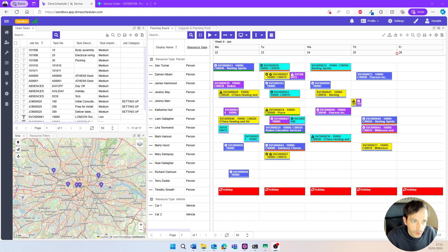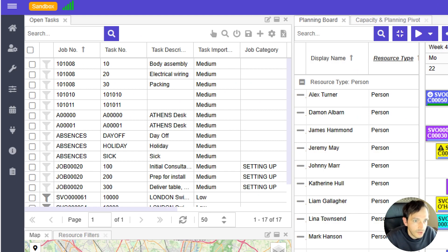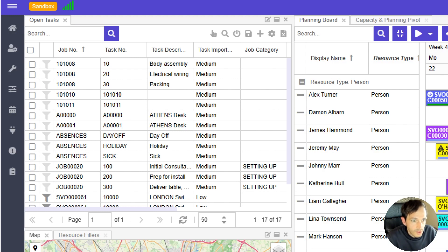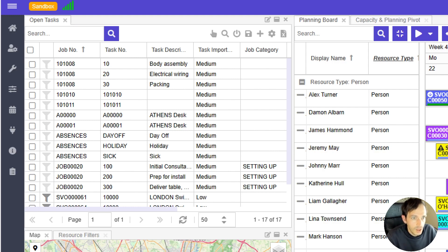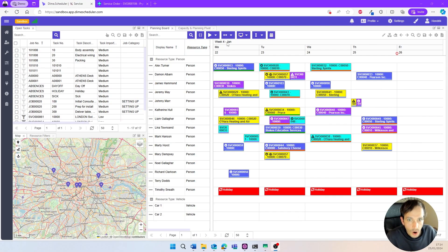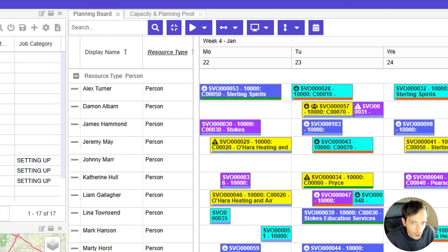Typically the story starts in the component at the top left corner of the screen called the open task list. This is a data grid that shows all the work that still needs to be scheduled. A task is simply a unit of work that needs to be completed — it could refer to service orders, jobs, production orders, or absences in Business Central, or even custom tables or external systems like Dataverse or your CRM. Tasks show up as individual rows on this list and can be dragged and dropped into the planning board in the middle of the screen, which is arguably the most important component.